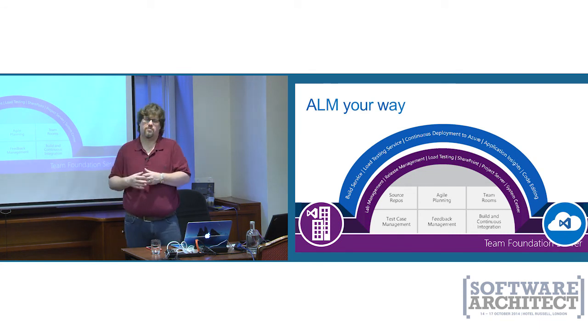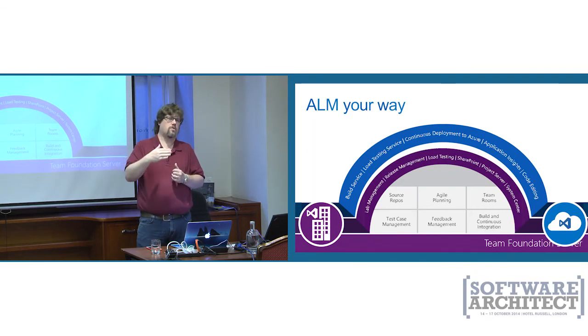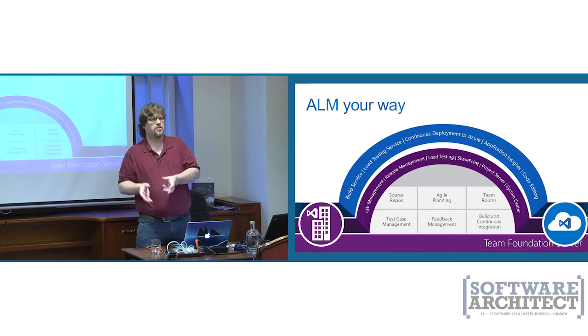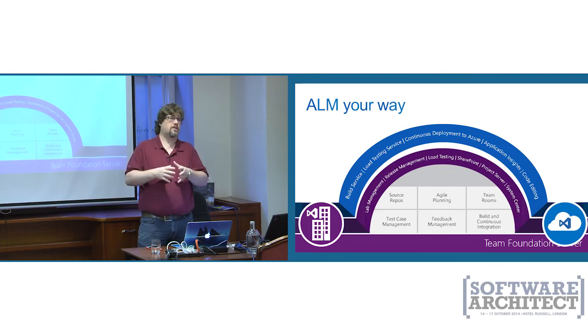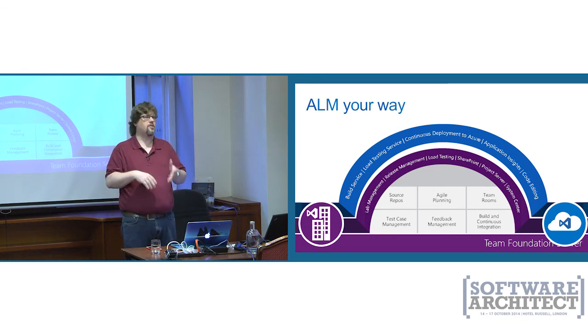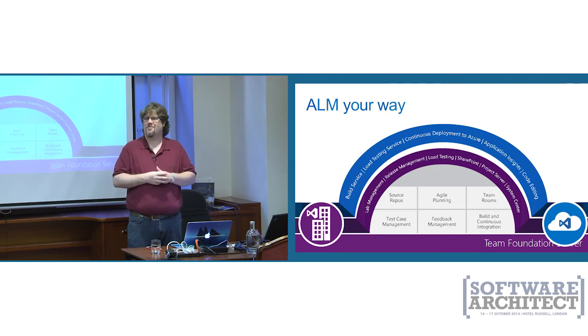And so for teams that use Microsoft technology, you can integrate your Team Foundation Server project with Project Server, and this allows you to provide that PMO with enough data to where they can look at what you're doing, but not care about the details. So they can see things at a larger scale of features or epics, and all the way down to PBIs or backlogs, requirements. But they don't necessarily care about specifically what you're doing, but they might care about hours, depending upon how things are tracked. But it does give you a separation of concerns there, so the dev team doesn't have to get overwhelmed by working with that system. It can be synchronized automatically. And the people who like Project and Project Server can sit there and run their reports, create their Gantt charts, and figure out their dates.